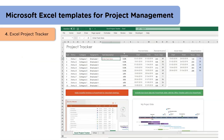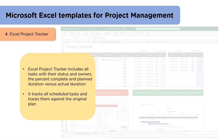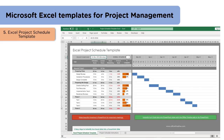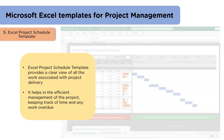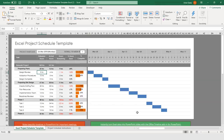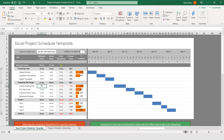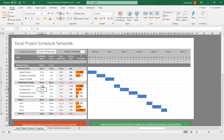The fourth template is the Excel Project Tracker. In this template, we have data of all the tasks with their status and owners. We can track the percentage of tasks completed and also compare the planned duration of a task to the actual duration. After the Project Tracker, let's check the Excel Project Schedule Template. This template helps in effective management of the project by monitoring the time each task takes, and provides a clear view of all the work associated with the project. If we change the estimated hours — for example, at Design Review from 5 to 15 hours, and at Create Staffing Plan from 20 to 2 hours — we can see the Gantt chart fluctuating. This is how we can use this template to manage the schedule in a project.